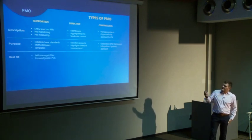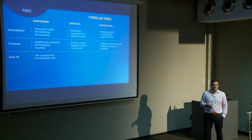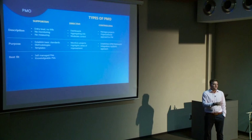The best fit for a supportive PMO, my opinion, from what I've seen, is a supportive PMO is effective where project managers are almost self-managed, right? Where they have a lot of knowledge, a lot of experience. So you don't need another layer of management to try and manage project managers that are already experienced and have the knowledge. All you might need is a standard protocol of how things should be working in the business. Make sense?